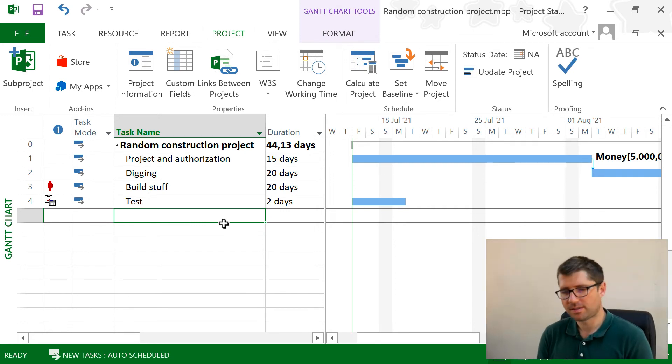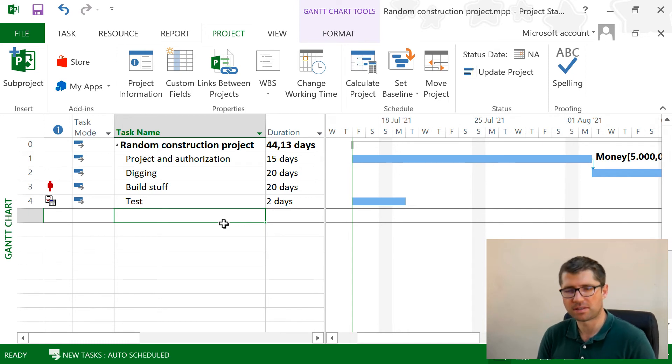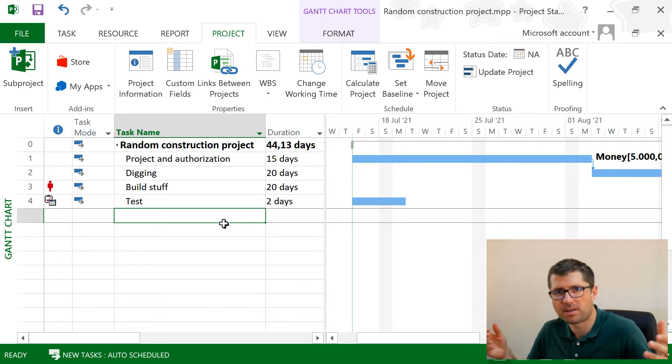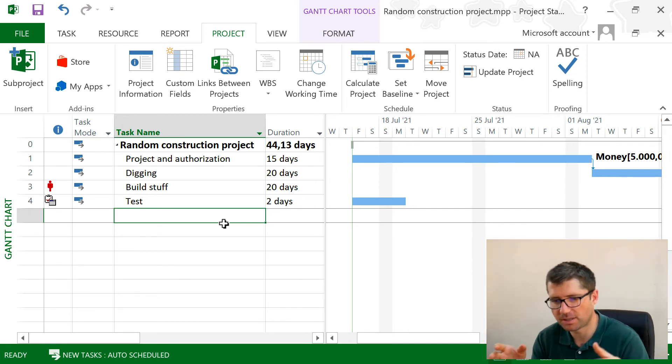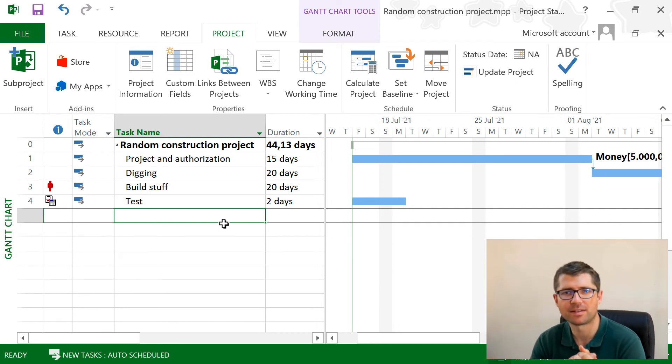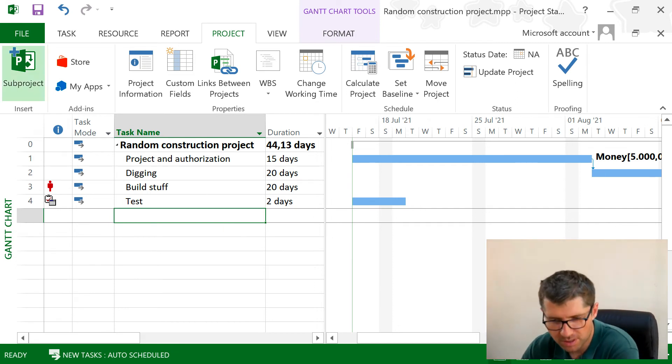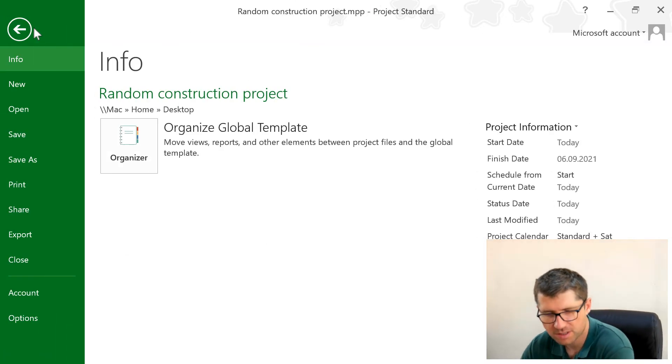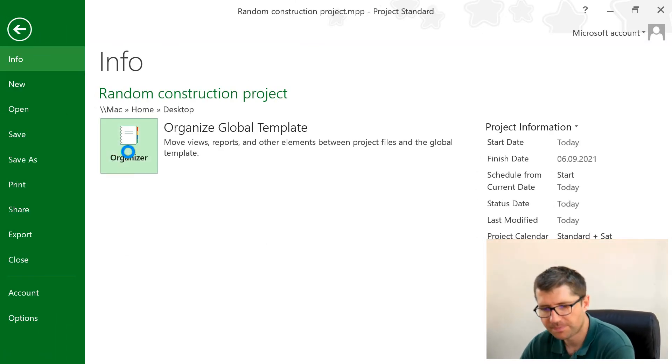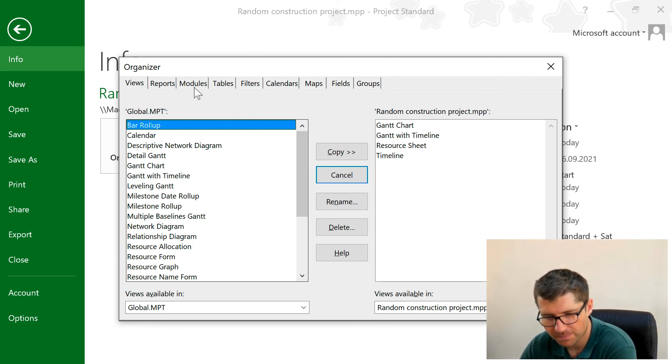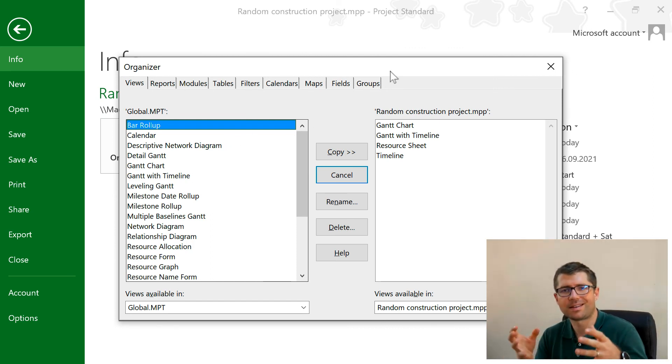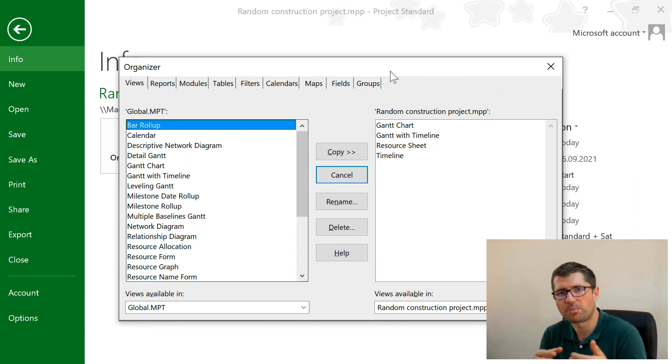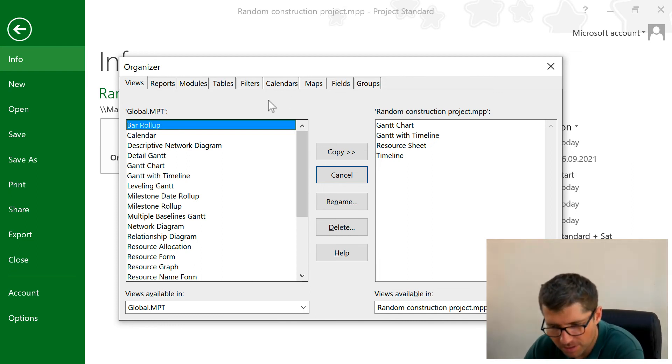Last but not least, let's talk about how we can save a calendar and use it on multiple projects. Because maybe I just customized a template of a calendar that I want to use everywhere. To do this, to be able to use it on multiple projects, I'm gonna go into the Project Organizer, because this is like the global template.